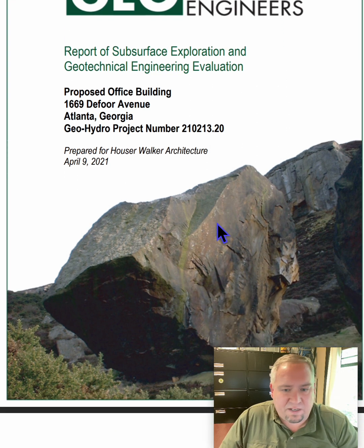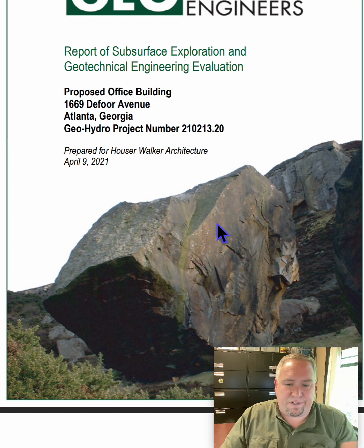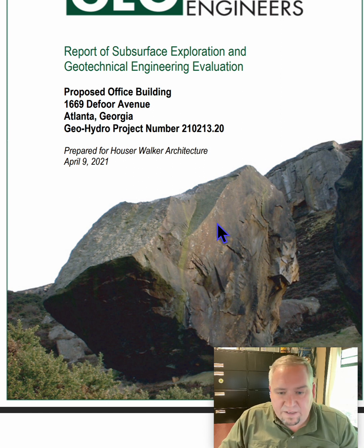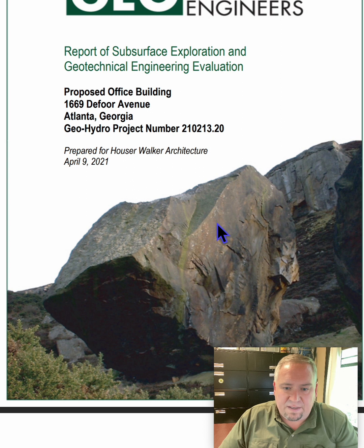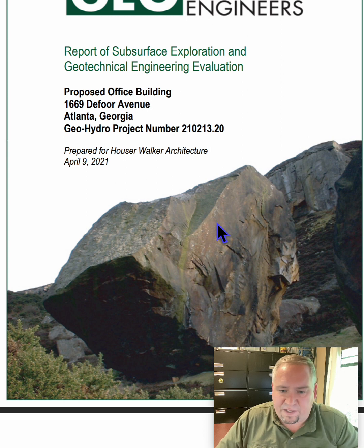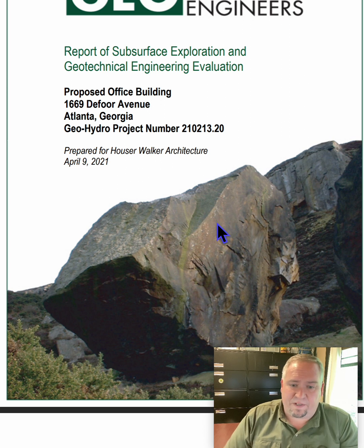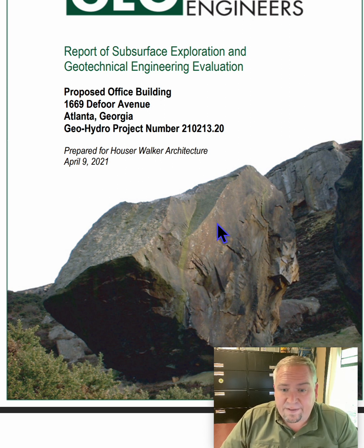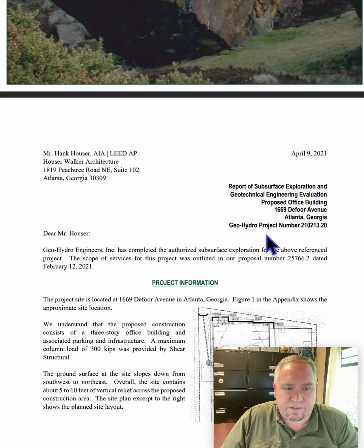So if there's been any kind of changes and this thing's 3 years old, okay, we might need to get an updated report. If you've seen the property conditions changed, it's been cleared, there's been some dumping going on, there's been demolition that's happened, anything like that, we would probably recommend potentially an updated report to capture those nuances.